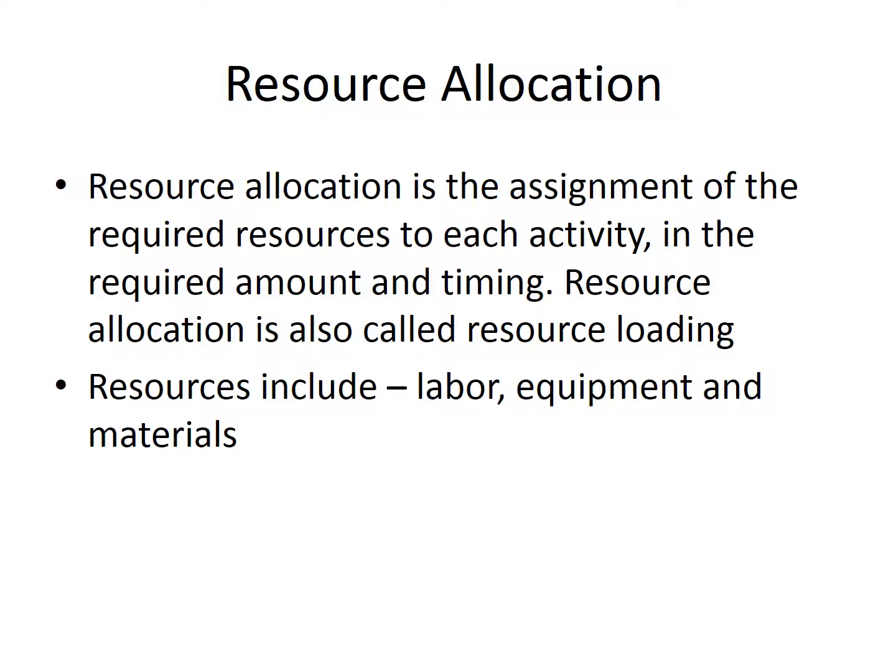So why this pertains to time cost trade-off is because if I have two pieces of equipment, I can save a lot of time, but I also have to spend money for the additional piece of equipment. So a lot of times as project managers, we'll look at stuff like this, evaluate whether it's cost effective to have a second piece of equipment on site in order to be able to accomplish more work simultaneously.